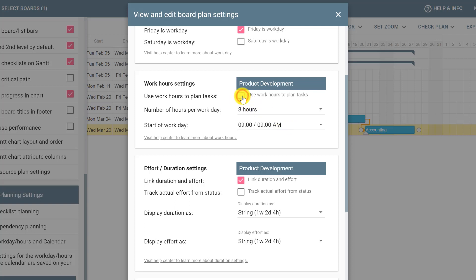If you don't want to use work hours to plan your tasks, you can uncheck this button and save your changes. In this case, a day will be considered as a 24-hour day, and if you plan a card with 24 hours this will count as one day instead of three days if you use 8-hour working days.